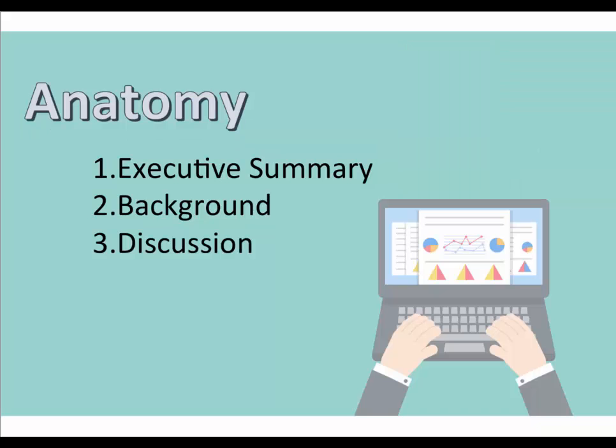The discussion is where we move into the devil in the detail. There are a lot of approaches, and this is probably the most significant difference in the business case for when you're writing it for antenatal classes as opposed to a $20 million expansion project: what gets included in the discussion and the level of information that might be included in that. But you're going to include things in here like what are the objectives, what's the scope of your project, what assumptions, what's your SWOT analysis, what's the cost benefit, and how are you going to evaluate it.